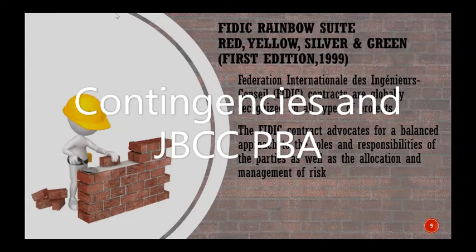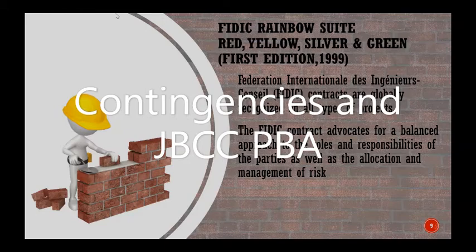On the project side you should provide for contingencies. Be careful — do not include things that nobody can manage or decide. Rather, make it a contract value excluding contingencies. Also, do not provide and include a provisional sum or an amount for CPA escalation. A court precedent has allocated that amount — which in one instance was an excessive allowance by the consulting team — to the contractor, because the interpretation was that the contractor was due that money or allowed to expect it to be forthcoming. So be careful not to allow and include items like contingencies and CPA in the contract.